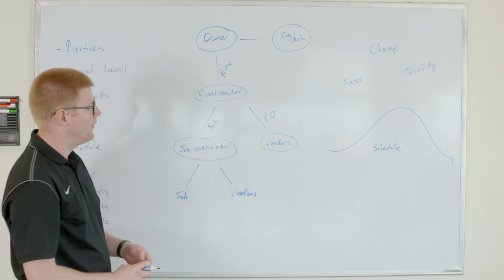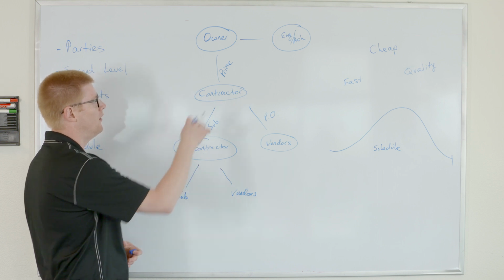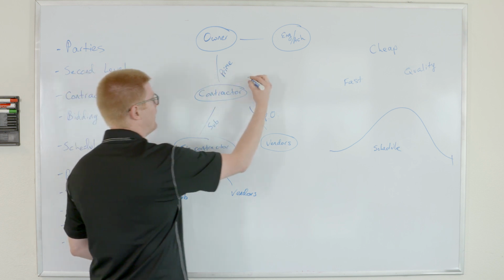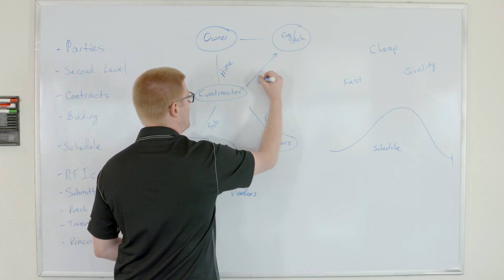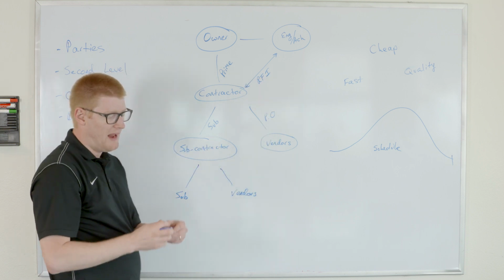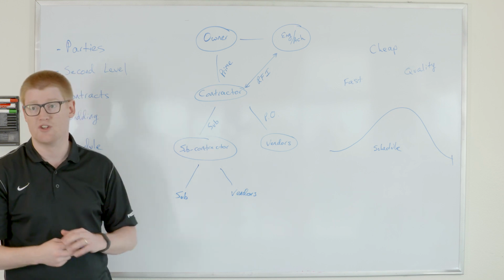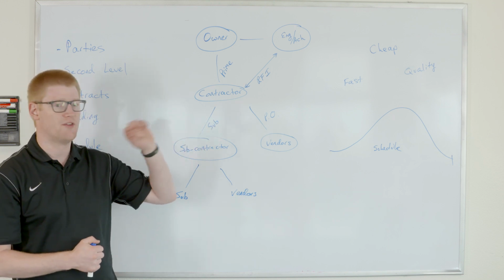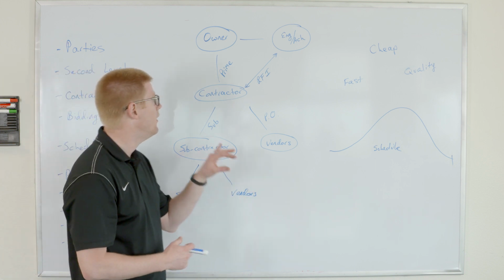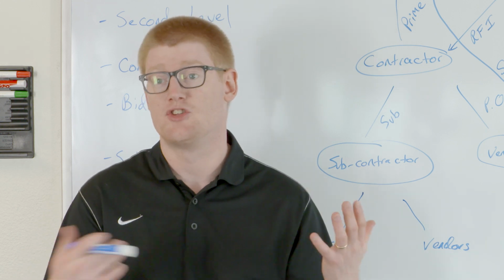They often start with a subcontractor, but for the purposes of this and our graphs, just to keep it cleaner, we're going to say they came from a contractor, because they usually come through the sub to the contractor and then on to the engineer. So a request for information is basically asking for approval, or how we want to proceed on something, and looking for an engineer's signature behind that. Procore handles it great and you don't even have to log in to the system. You can simply reply to emails. It's really easy. RFIs often lead into another tool that Procore also handles, and that's change orders.